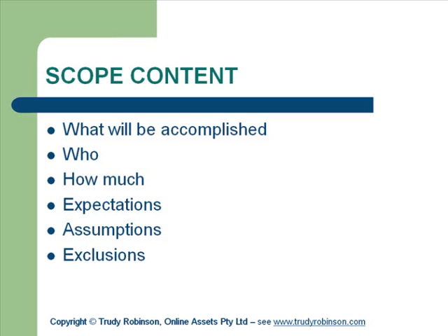Okay, but just in principle, you're okay with what the scope is. It's a summary document. It means that somebody who's never heard of your project can actually read that and understand in principle what you're going to do and who's going to be impacted and, as I say, the how, who, when, why, what, wherefore. What's exclusions? Exclusions are things that you're not going to do. Now, in a scope, if you do not identify what you're not going to do, then the assumption is that you're going to do it.